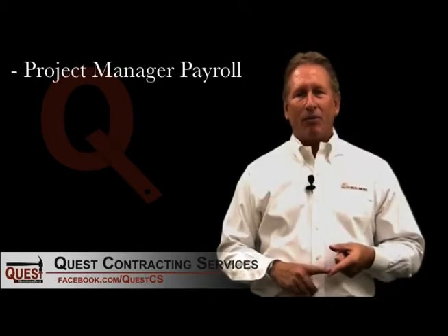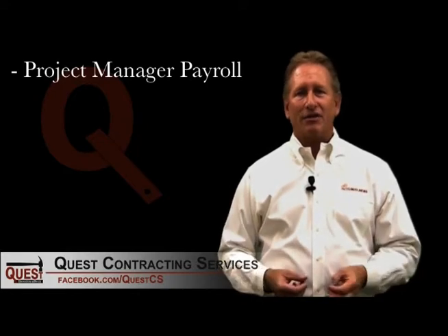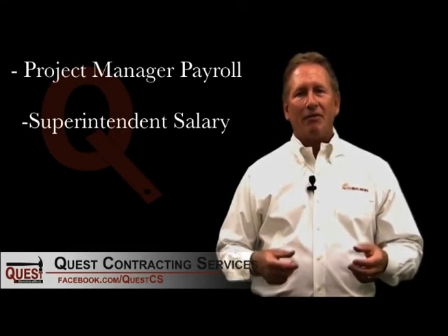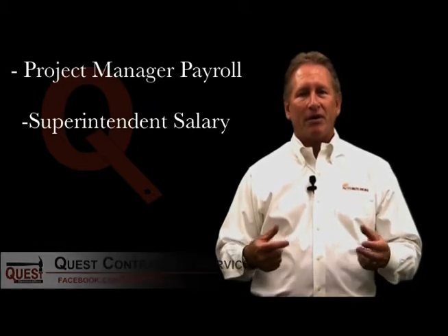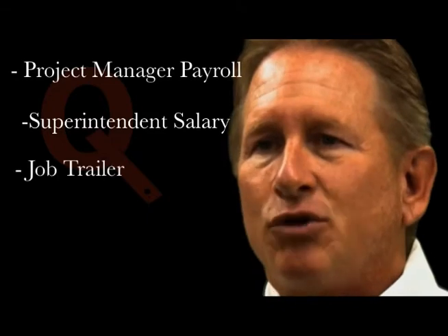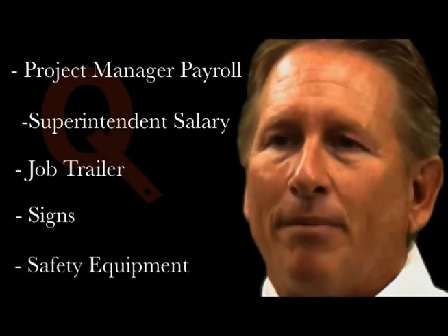And what those costs typically are: the project manager for the job. His payroll is actually allocated as a cost of the job in the general conditions. Also, the superintendent that's on your job full-time, his salary is part of the general conditions and considered a cost of the job. The job trailer that we put out there and our signs and our safety equipment.